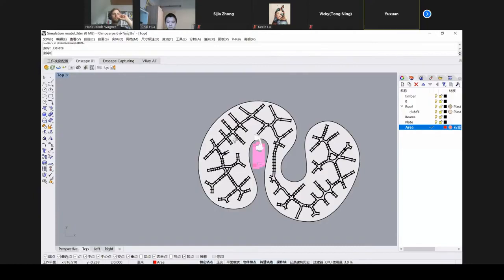And after assembling all the beams on the ground, the roof can be flipped by the cranes and placed on the top of these columns. That's all.